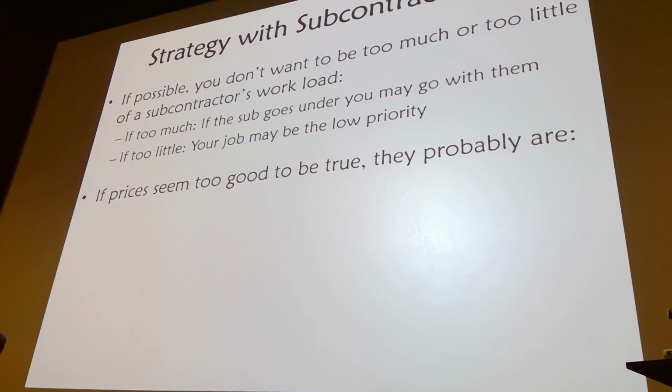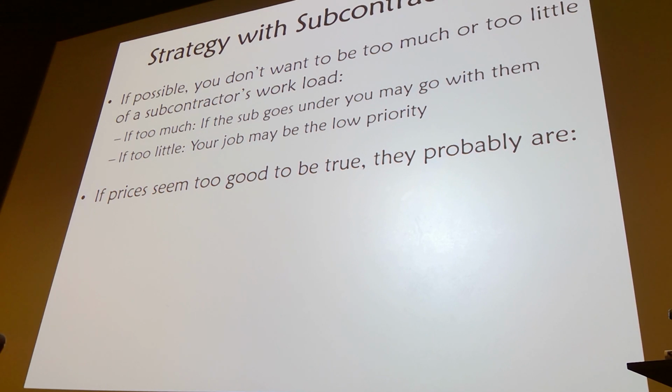Strategy of subcontractors. We said you don't really want to be too much or too little of the subcontractor's workload if you can help it. Being too much, yes, you get good response from that subcontractor, but if they go under, your whole business is going under too. If being too little, you're not going to get the response from that sub when you need extra manpower than you might otherwise.